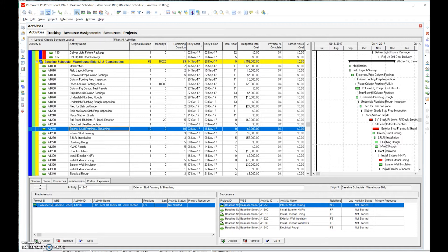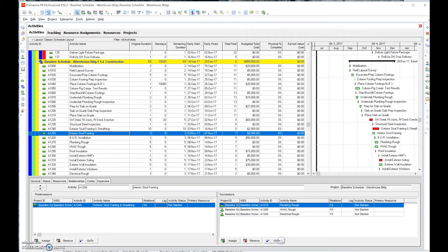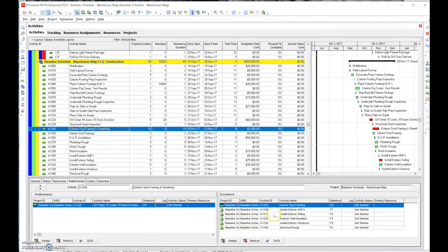Look at the activity I have highlighted there — exterior stud framing and sheathing. You see we have one predecessor but we have six successors. They all may be legitimate, but we need to go through and look in detail to make sure. So we'll say: exterior stud framing and sheathing — the next one is interior stud framing. Does that make logical sense? Going to interior stud framing, you can see that that is the only predecessor it has.